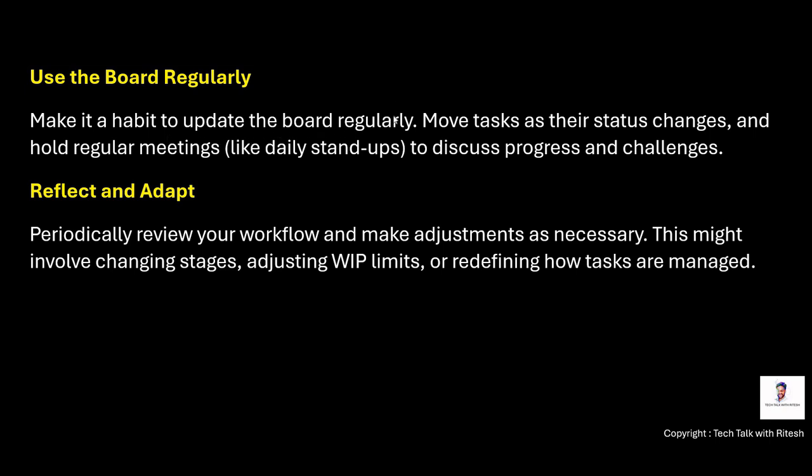We sometimes have stand-up calls also, for example a 15 to 20 minute call where all the team members will join, and explain, okay, this is the task which was in to do yesterday, and now I started working on it, so that's why it moved to in progress state. Move tasks as their status changes, and hold regular meetings like daily stand-ups to discuss progress and challenges. Reflect and adapt: periodically review your workflow and make adjustments as necessary. This might involve changing stages, adjusting work in progress limits, or redefining how tasks are managed.